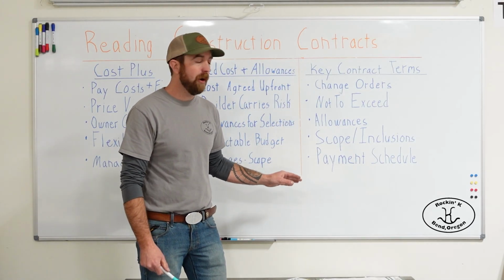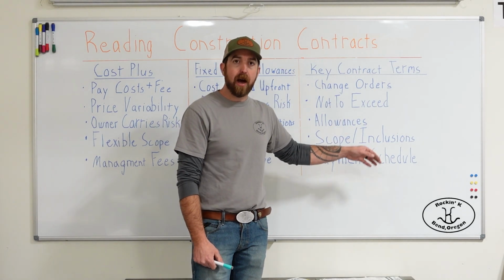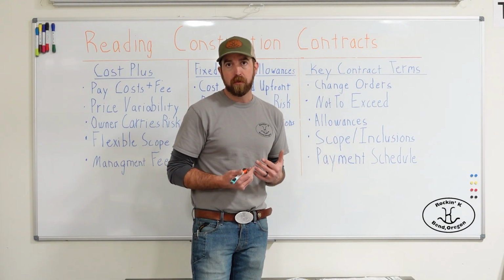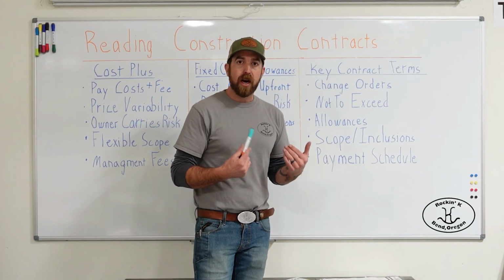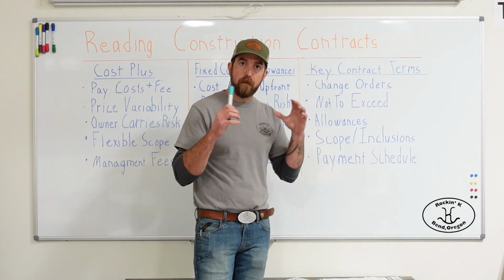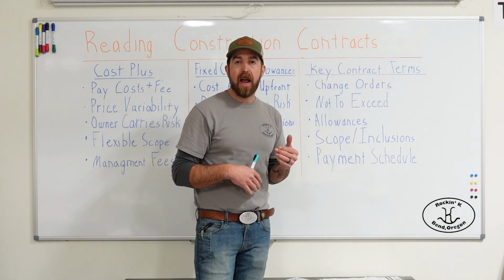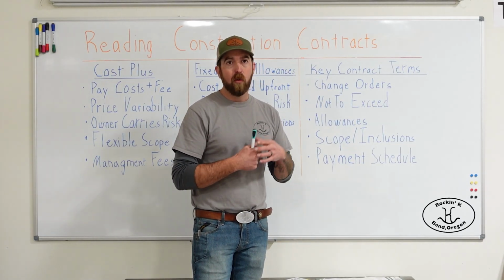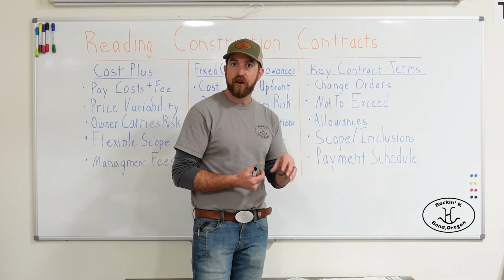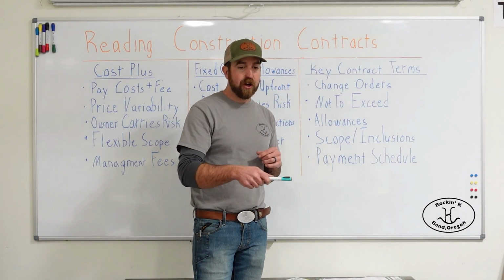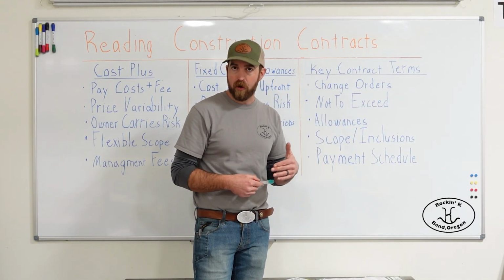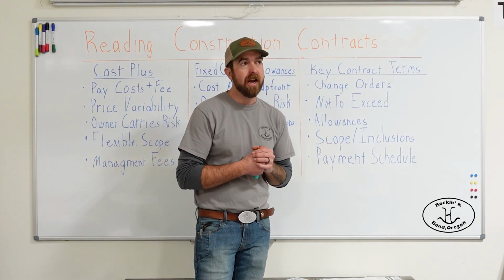And another really important thing where I see hiccups happen is in a payment schedule. You want to know what the builder's payment schedule is. So for us at Rockin, when we're working on a big scale project, we're billing every other week. And that way there's just a cadence, there's a regularity. We have our meetings with our project manager every 2 weeks. So you're getting the bill, and then 3 days later you're meeting with the project manager so you can go over that bill well before the due date.